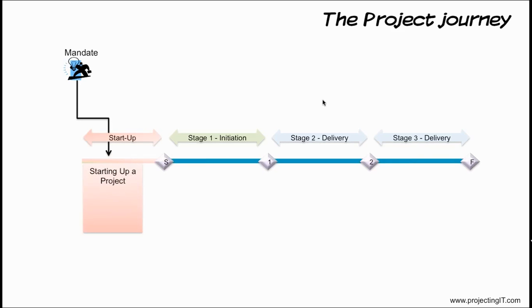If required, we will appoint the team manager. The project board also decides whether they need to use project assurance. In starting up a project, we'll appoint the team, that is the project management team, will define the high-level scope and requirements, will define the high-level quality expectations, and the project approach, that is how the project work can be done, whether internal suppliers and resources can be used, or we need external suppliers or resources.